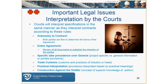The courts will interpret specifications in the same manner as they interpret contracts. Common rules of contractual interpretation include: the written document is the entire agreement, specific provisions take precedent over general boilerplate provisions, trade customs, practical interpretation, and construction against the drafter. Depending on what state you're in, these will be taken into consideration by a judge in a certain order, but it's important to keep them in mind.